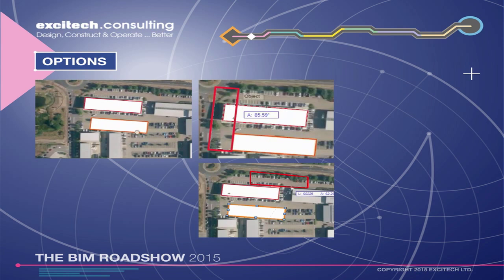He would also have to consider temporary relocation if we did have that opportunity to extend, so that would be an extra cost to him. I also explained that the cost to construct a new build would be the same as the cost of the extension. The difference is pretty negligible, but he would also have that additional cost of refurbishment. So, I showed the client these sites. We have the smaller plot of land on the left and the larger plot of land on the right. So let's have a look at these individually.